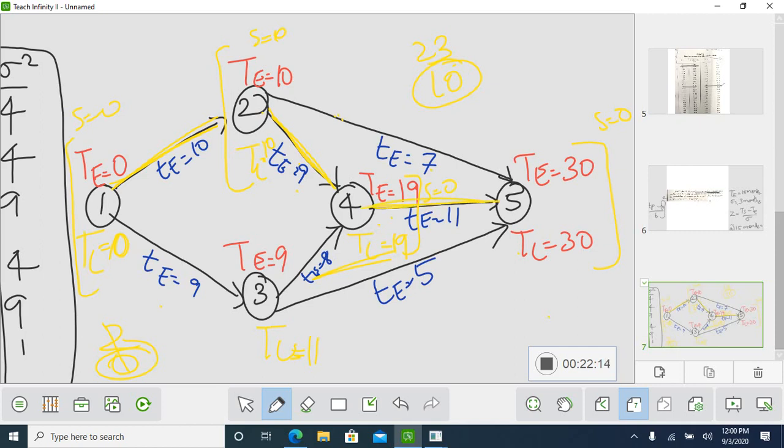So this is your critical path. So you have found the critical path and you have found the slack value. So using the slack value you have found the critical path. So now what will you do? You have to find the probability whether the project can be completed in 35 days. How much percentage of chance do you have to complete this project in 35 days? So what will you do? The deviation along the critical path is given. So you have to